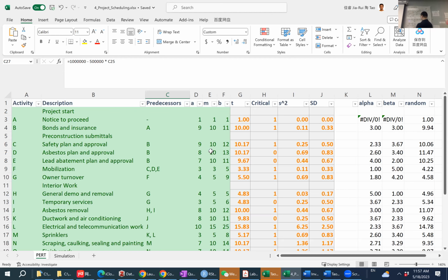That's why when calculating the total duration, although both C and D are on the critical path, only one of them is going to be accounted for in the total duration. So we use the same idea and we do the rest of the calculation. So in the total duration calculation, we have one of C or D, then F, G, then only one of H or I.